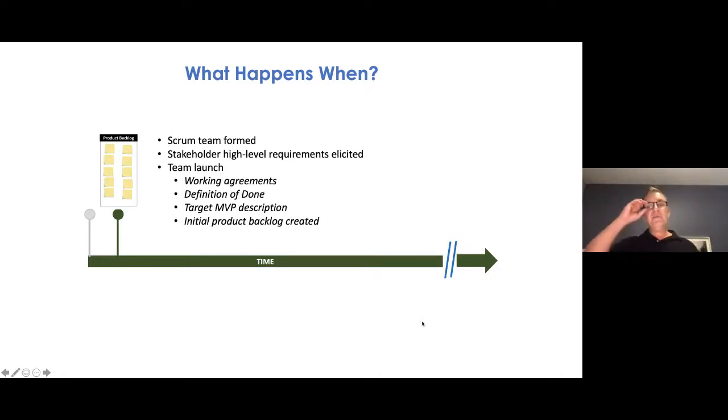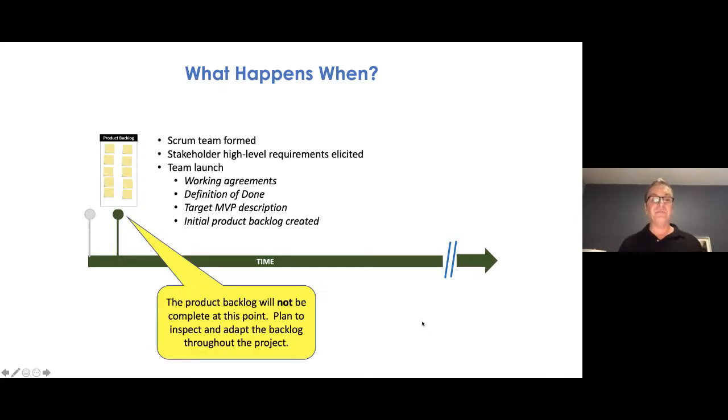And again, as I mentioned, this process of building the initial product backlog, our starting point, should never take longer than a day. When I say a day, if you're captive with the entire group, with all the stakeholders either directly or by proxy in the room, you ought to be able to get it done in less than a day. Sometimes because of scheduling and other logistics, a day might equal 2 hours a day over a multi-day period. But don't go on and on more than 8 hours building your initial product backlog. Get started on building the product and make time to refine it after the fact.